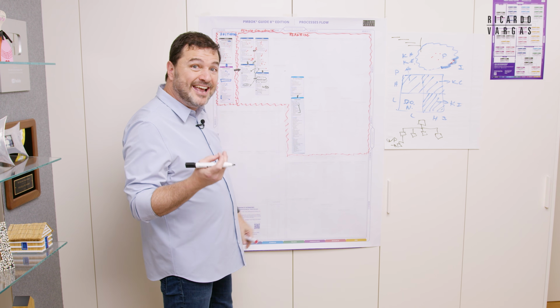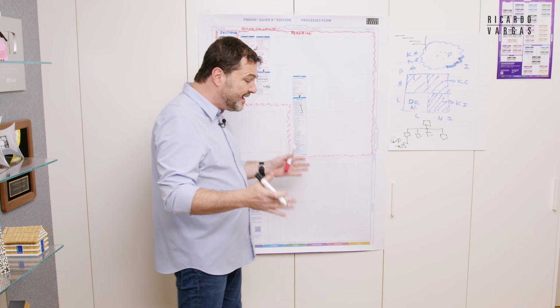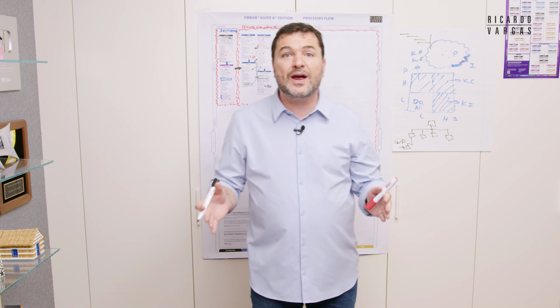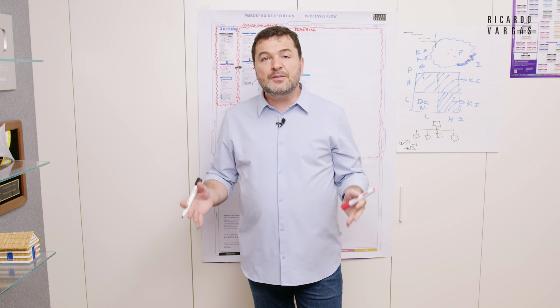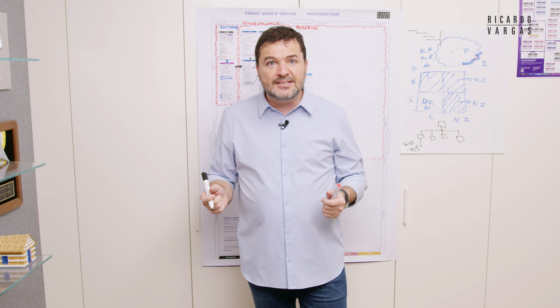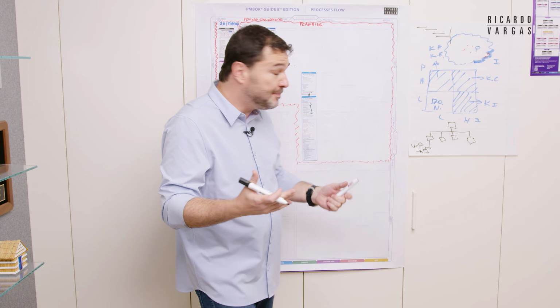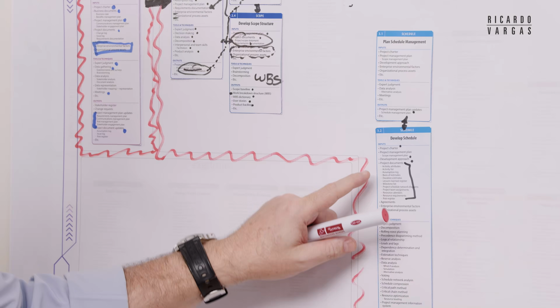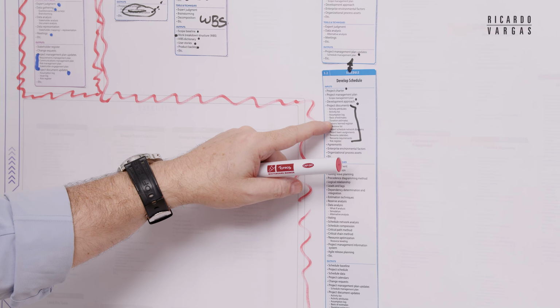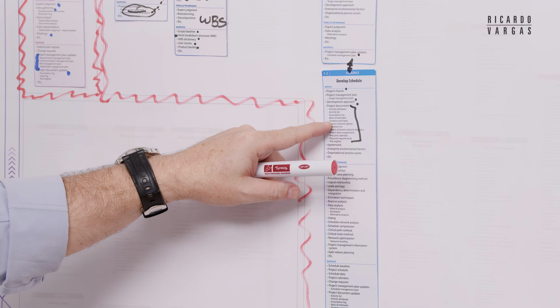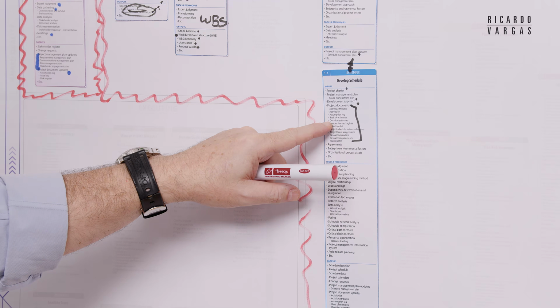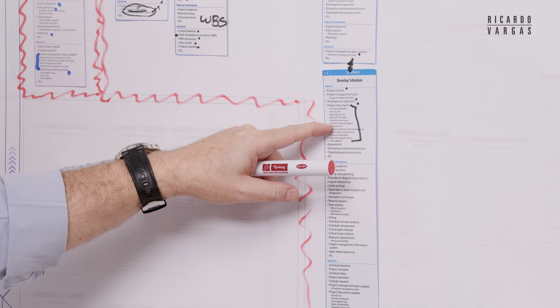For example, if you are estimating something, I'm taking 10 hours to do this 10 square feet area. It means that the basis of estimate is 1 hour per square foot. It's parametric modeling, for example. What is the basis of your estimate? The duration estimates. You are estimating the duration of the work. Lessons learned register.